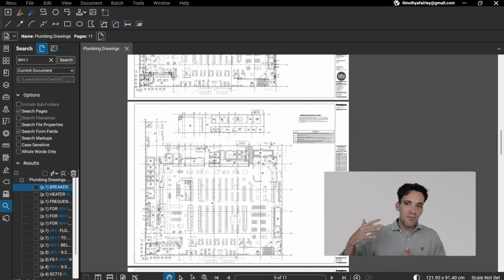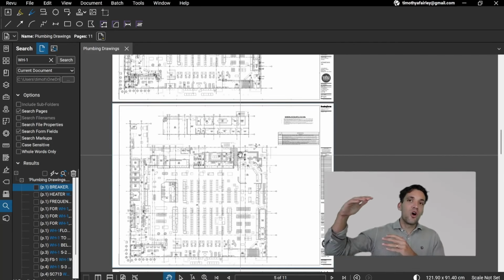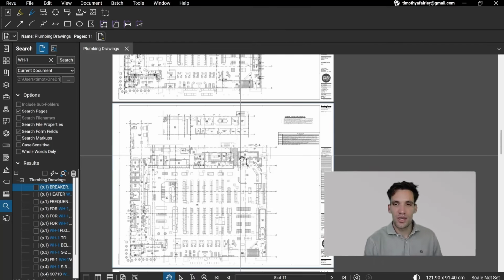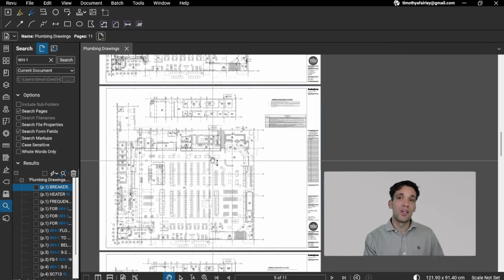It's something you physically measure on the drawings, but associated with that primary quantity, we'll have a whole list of items to install that. So for example, per lineal meter of pipe, we might need a hanger, we might need some sealant, we might need fixtures to connect the pipe. So rather than actually counting how many hangers we need, which would be impossible from the drawings, we take the primary quantity that we measure, which is the linear meters of pipe, and then we derive the number of hangers and other units from that. So that is what is referred to as an assembly.